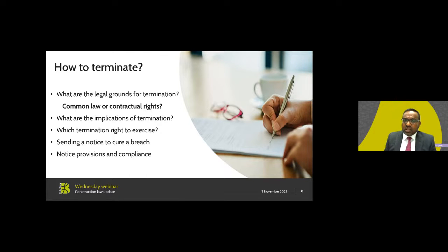Another example is where one party, whether by words or conduct, refuses to perform the contract in some material respect, or shows an intention not to perform the contract at all, such as failure to attend site to commence work, or abandoning the site during the works.